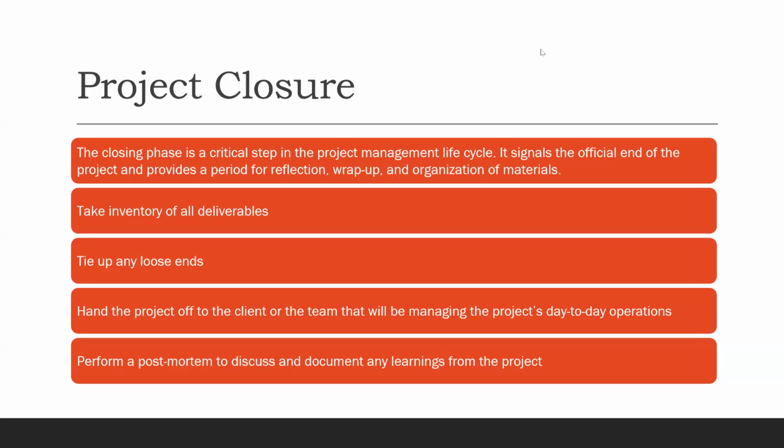So when the project ended, it was funded by the International Labour Organization. When the project ended, child labor didn't stop. So we had to make a plan. And within the closure phase, we established a child labor desk within the Ministry of Labor. And we asked the Labor Ministry to put somebody on secondment to that desk.